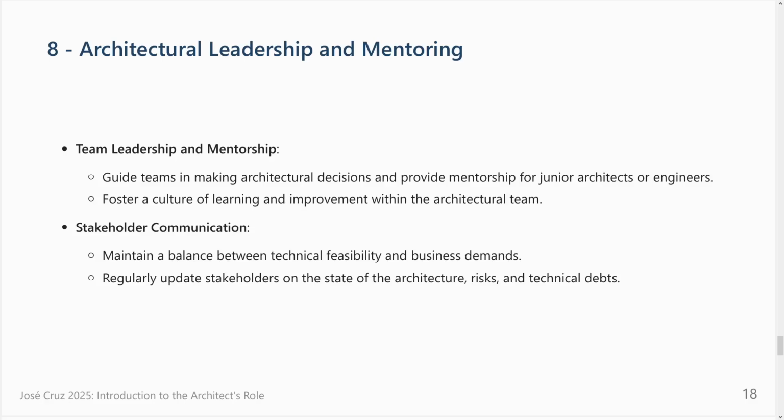We are accelerating here due to the time constraints. We are creating a technical debt. Later, we'll need 1 or 2 months to put the system at higher quality standards on the code, or maybe you can hire someone just to do that and improve the code while our team is developing other business things in our application. That's one way to approach this.